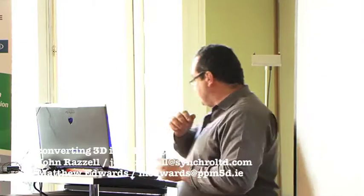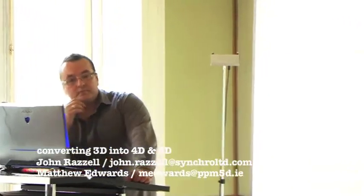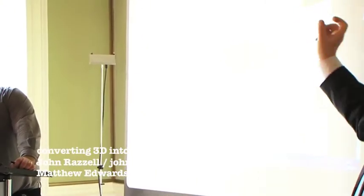One of the other things, of course, is with Synchro, you've got that delay, but you can then start moving bars around and saying, well, what if we do this and what if we do that? Then you can run the scenario to see what impact that might have 2 months down the line. Because that's the important thing.